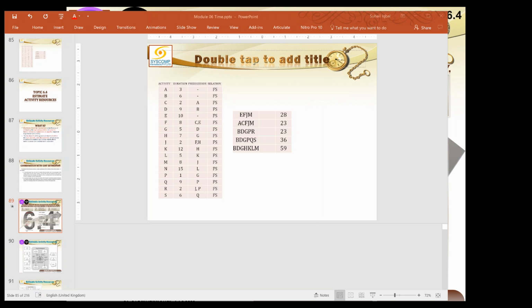And then you go over to the published estimating data, which is created by volunteer bodies or other professional bodies who have done a similar kind of job. So you would know what is the capacity or capability of a person, how much that person can do. So if there is a mason, what is expected of a mason to accomplish in a specific period of time. Maybe you can say that a mason can build a wall of 2 feet in 1 hour or whatever.